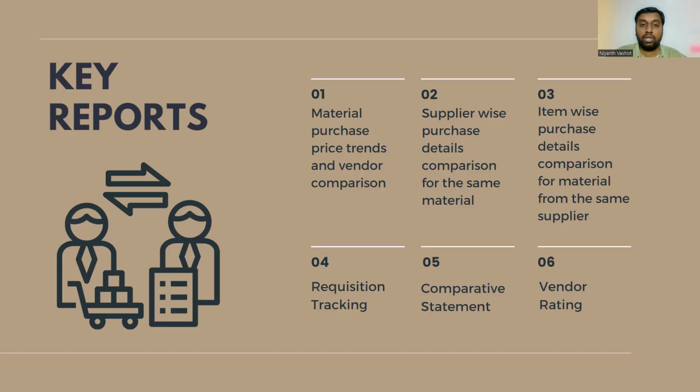His biggest project was only 80 lakhs. So that is why we rejected, because we don't know whether he can pull off a 4 crore project or not. We went with the second one, even though it was 7% expensive, because his biggest deal was 8.2 crores. So we knew that, okay, this guy can pull 4 crores. It's not a huge amount for him. So that also needs to be done.